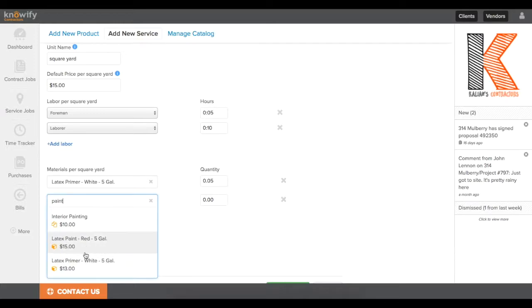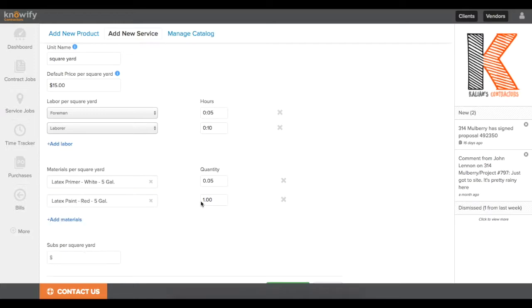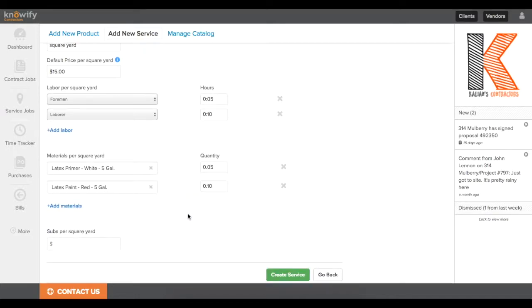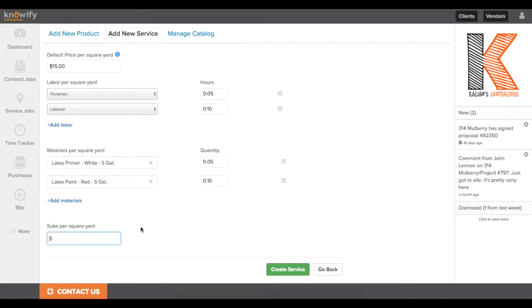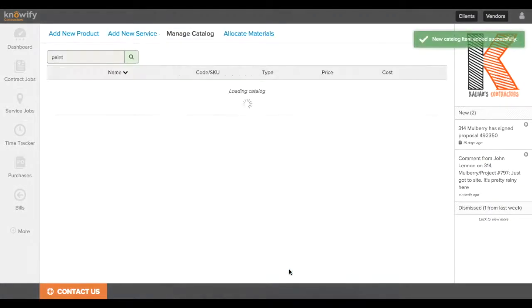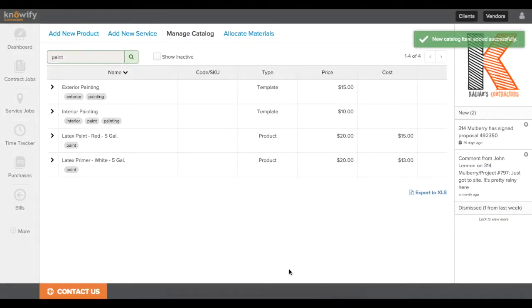I'll pull in paint as well, and since I'm budgeting for two coats of paint, I'll just double up whatever I put in for primer. And the last field here for subs is just if you're going to be hiring a subcontractor that's not an hourly subcontractor, but someone who's on a lump sum contract. So in a situation like this, I'm budgeting $10 of subcontractor cost per each square yard. And now I'll create this service, and I can see that it's added to the catalog as well.